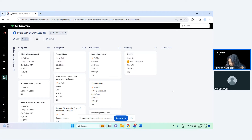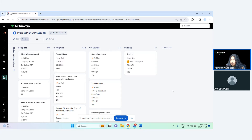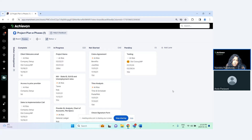We have to keep in mind that there are some limitations to this board view. You can't see hierarchy, this view is not available in reports, you can't embed this view in dashboards, and you can't display it in work apps. So just a few limitations with the board's new feature, but it is a really handy tool to have for your sheet.